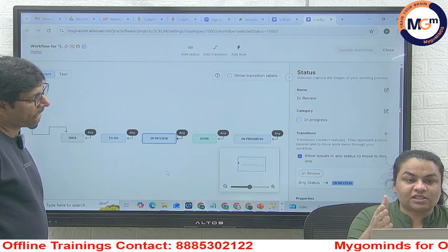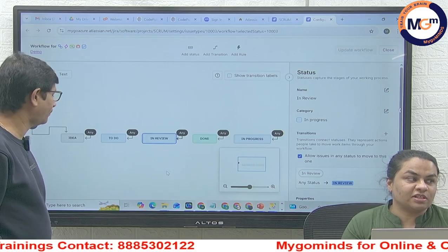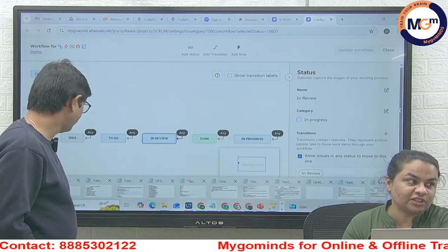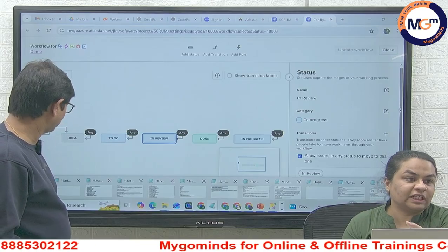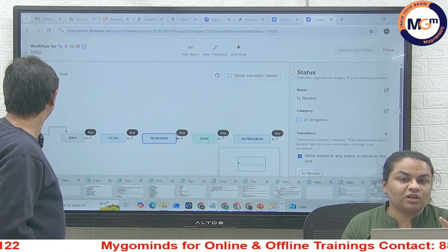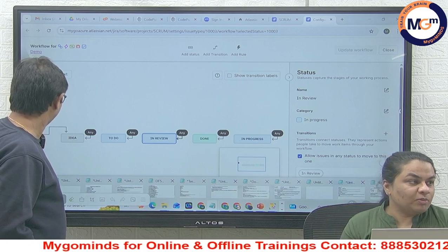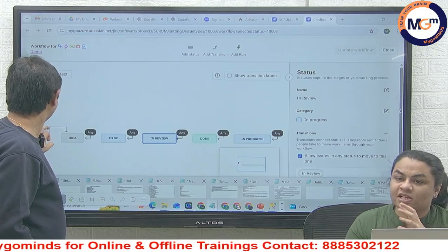Everybody will get a status update weekly from the same place, guys, because this is the one place where we have the status and everything. We attach it to Slack or mail. So they will directly see where exactly the current project stands: what is the finished work, what is in progress, what is yet to start, and what the blockers are. Everything will be set in a status. We'll use those templates and send it to the stakeholders.